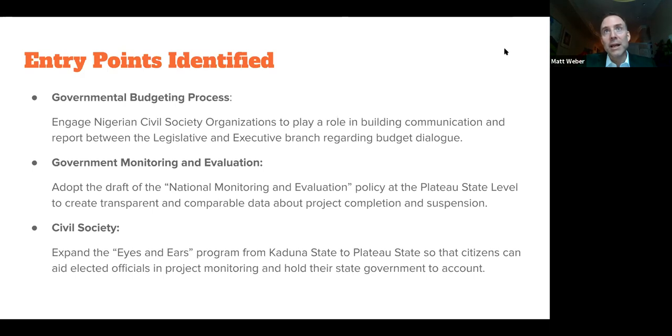at present, the governor would put forward infrastructure projects with a budget, and then the state legislature would come back with an amount of budget awarded, which would be less than that total amount. So for example, if your project was for $10 million, you might only be awarded 6. That would be plenty to start, but it wouldn't be enough to finish the project, let alone take into account inflation. So creating an enhanced dialogue between the executive and the legislative branch might partially amend that key issue.